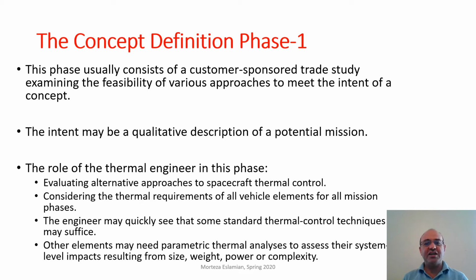This phase usually consists of a customer-sponsored trade study examining the feasibility of various approaches to meet the intent of a concept. Again, this depends on the size of the organization. If we are talking about NASA, then NASA may want to sponsor a trade study on the Artemis mission going back to the moon. Then NASA would be the customer, and NASA may want other companies to perform this concept definition study.